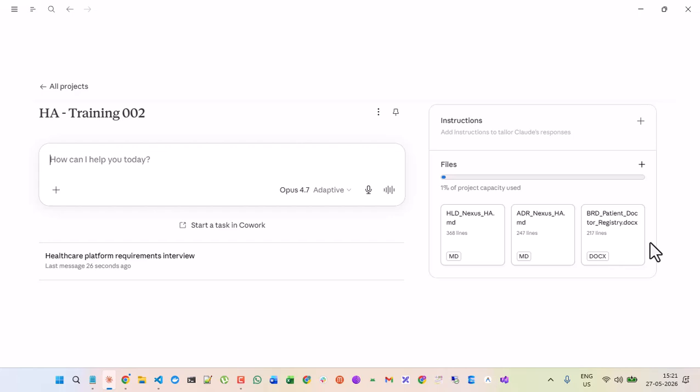For example, Aisha created the BRD given to Sri Krishna. It may so happen that based on the decision he has taken as a solution architect, there is a drift which is coming out of BRD. So, as a solution architect or as a stakeholder, either of the people, they should see how both of them are aligned. If there is only 5% drift, ignore it, not a problem at all.